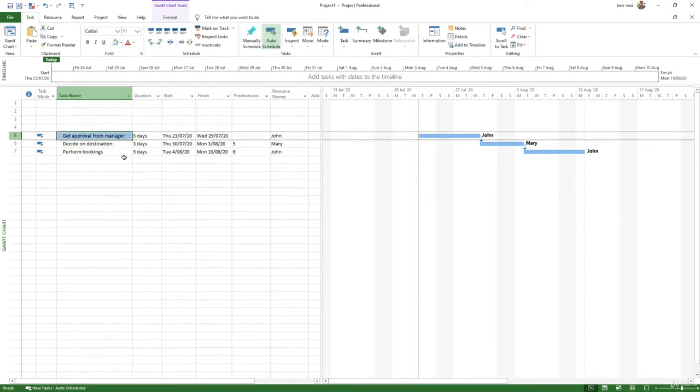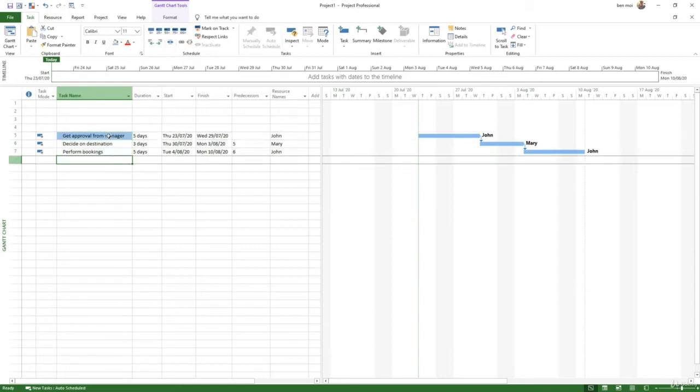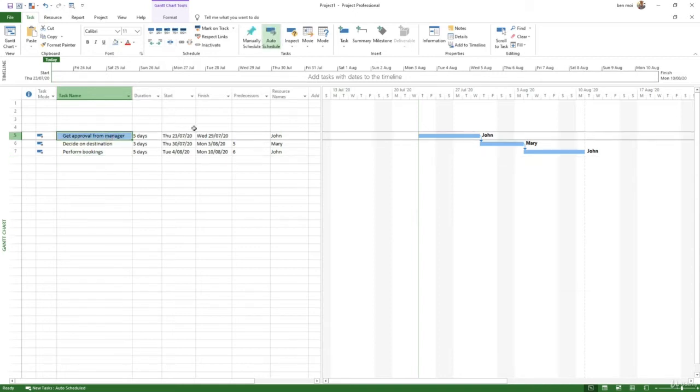If you want to change the color of the cell, let's call it a cell. If you want to link the tasks, and we'll go through this as well. Microsoft Project for me needs to be in auto mode. So manual schedule is when you want to input the dates yourself, but auto mode is our default that we'll be using. And then all the rest we can safely ignore for the time being,